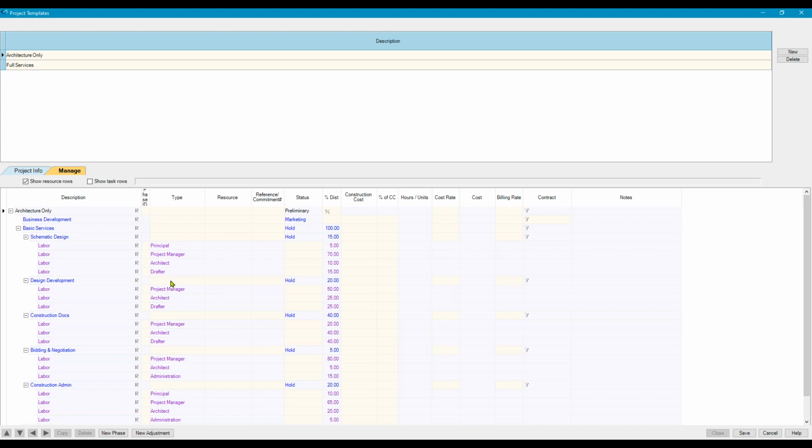We don't want you to do that, because these percentages would have to be assigned to every one of your employee types. And then, when we use the template, we would have to delete unused employee types and adjust these percentages. We have now just worked against efficiency. So I know it's possible for your team to come up with the employee types that we think would most likely be used on these phases, and that's the coaching you want to provide.